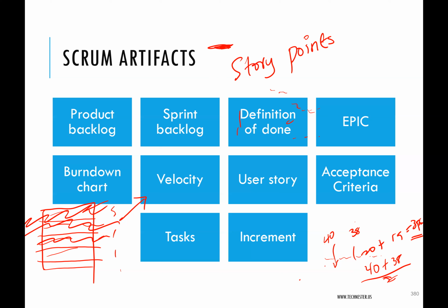But story points are just a way to compare the complexity of one task to another, or one user story to another. Remember that the product backlog contains user stories, and we need to estimate how much of these stories we can do in a sprint. As our sprint is 2 weeks, how many of these requirements can we do in a sprint? That's the question that we answer during sprint planning. How many of the story items in the product backlog can we do in a sprint?